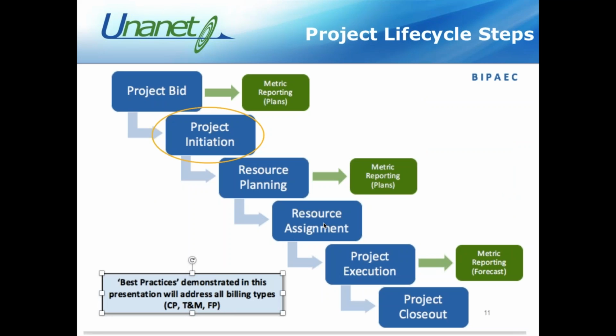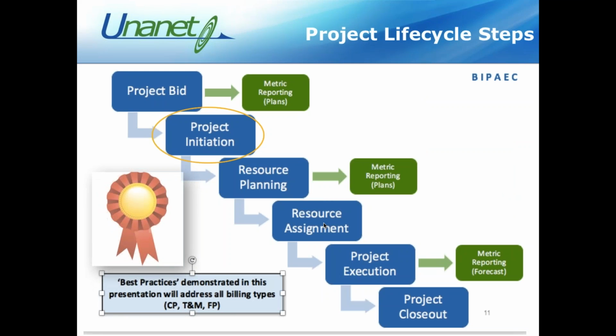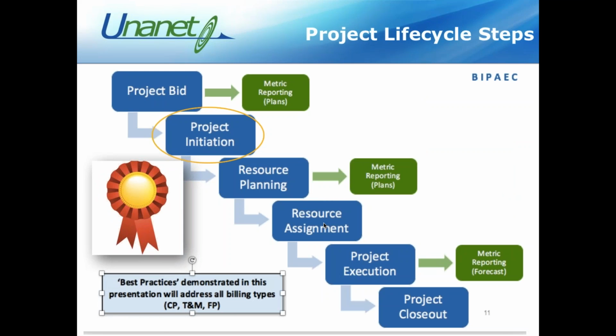So that will happen, and the contracts manager will plan placeholder resources and expenses and come up with a bid, and then it gets sent off to the powers that be. They're going to decide upon the award. So once the contract is awarded, and let's pretend in our situation that of course we won the award, we had the most competitive bid, we have to initiate our real active projects, or billable projects here.